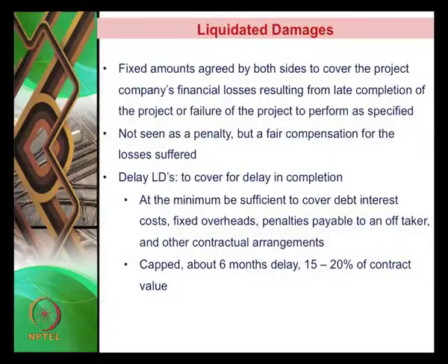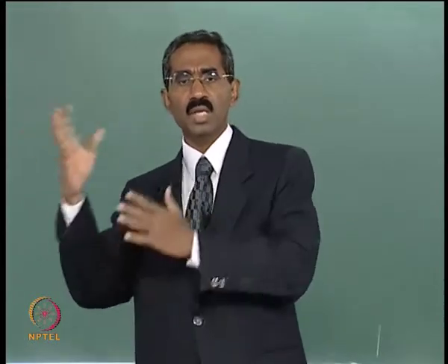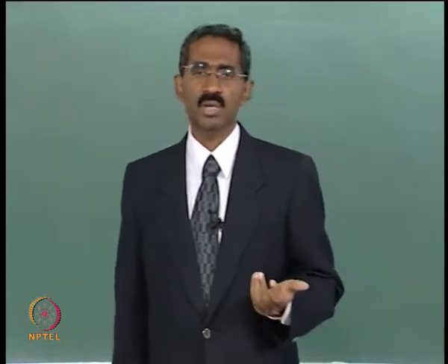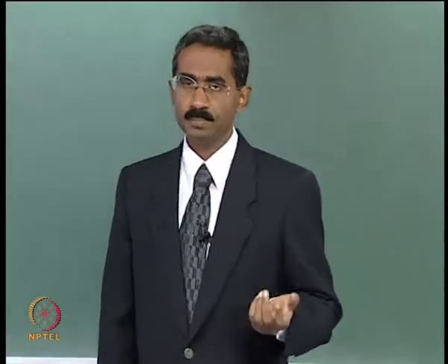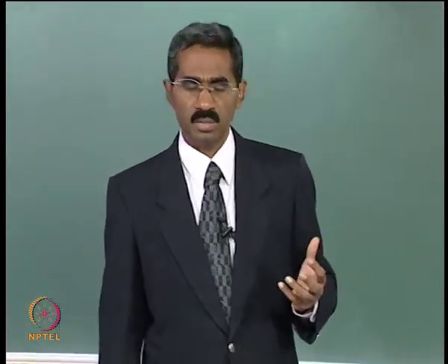So liquidated damages are essentially fixed amounts that are agreed by both sides, that is the project company as well as the EPC contractor, to cover for the project's financial losses arising from either late completion of the project or failure of the project to perform as specified. So remember, when the project is completed late, a part of the revenues are lost or the part of the revenues are delayed, right. So this creates some kind of financial loss for the project company, and if the project fails to perform as per agreed standards.